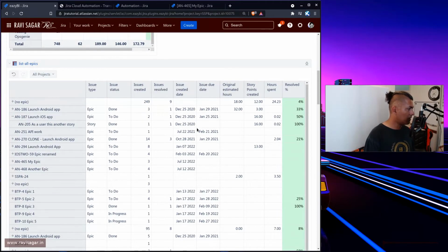Are we talking about this one as well? So for this particular issue, we have one issue marked as done, and the other one is not marked as done, right? So this will of course tell you the breakup, and at the same time you can calculate the percentage, which is fine. But if you have all the items marked as done, then your parent should be marked as done, right? Or you can at least, let us say, the progress is 100% here.